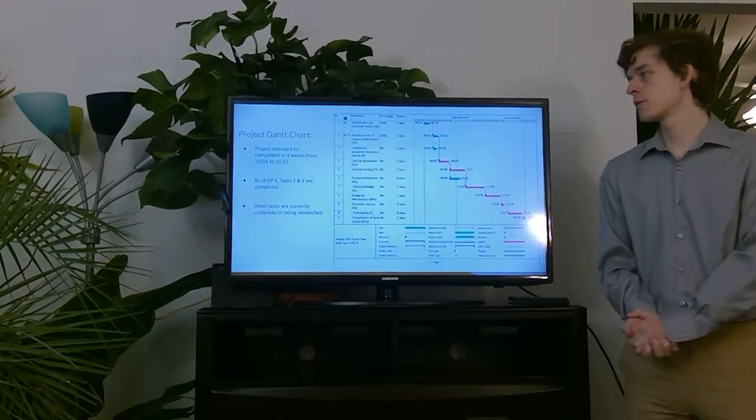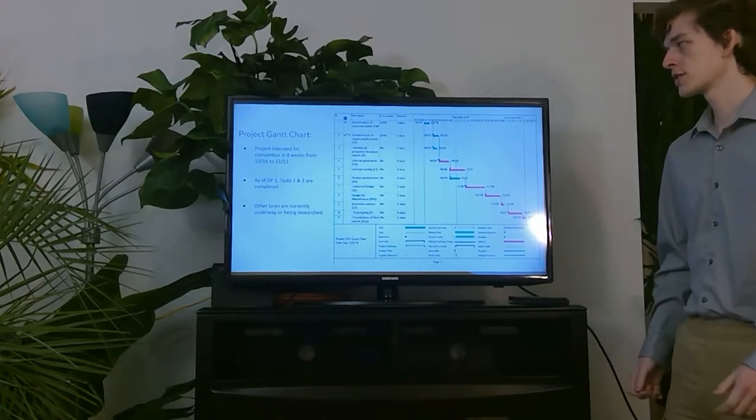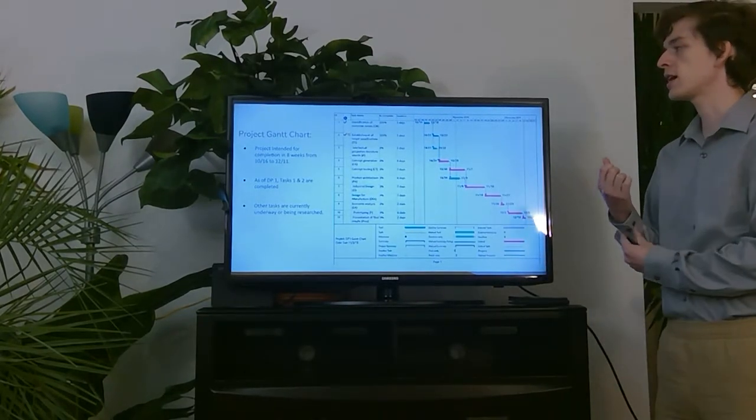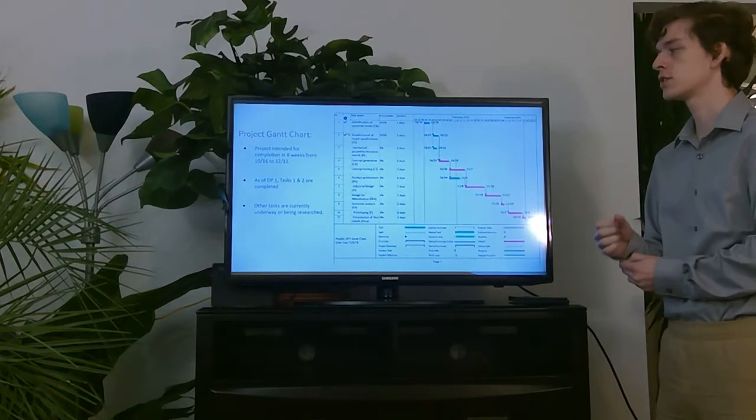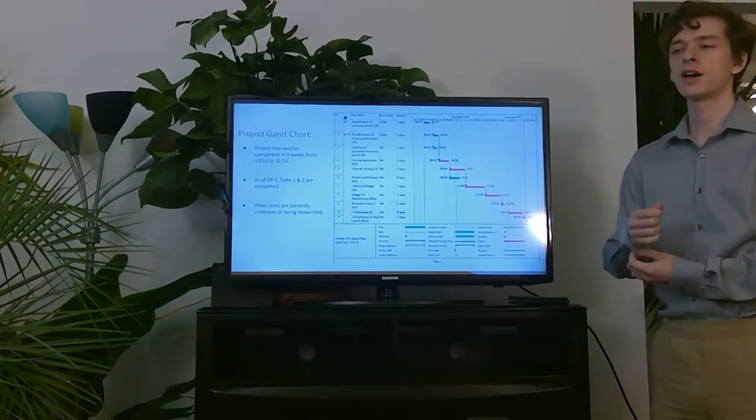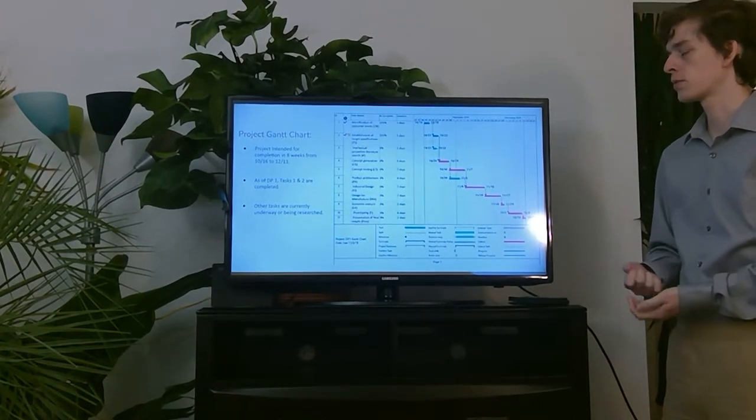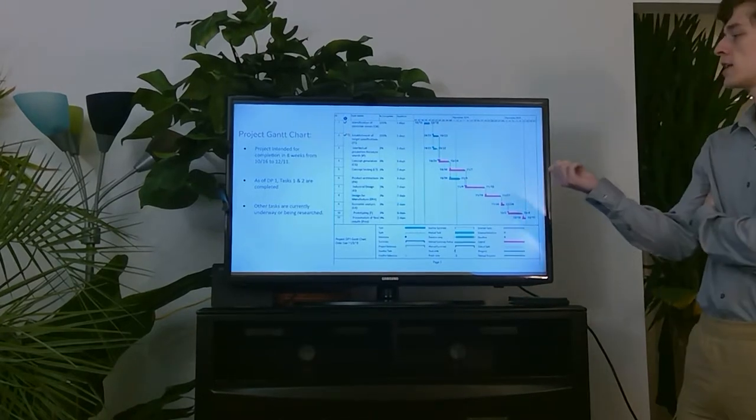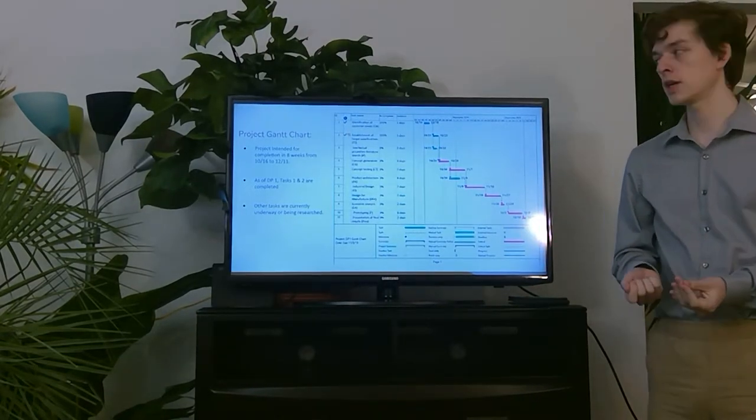For this project, we developed a project Gantt chart. The project is intended for completion within eight weeks from 10-16 to 12-11. As of our first design review of this DP1 proven task, tasks one and two have already been completed, that being identification of customer needs, as well as the establishment of target specifications.